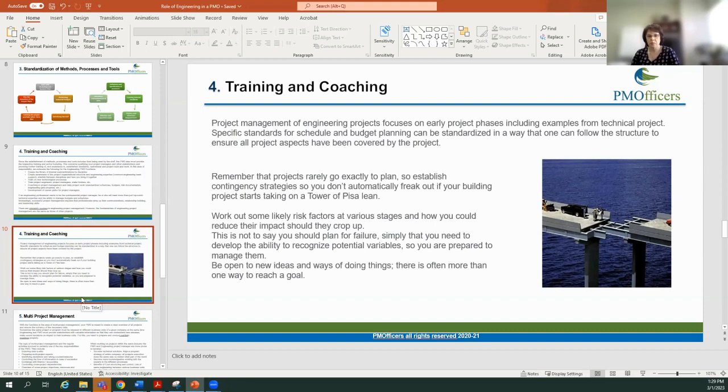So as an example, you can create templates for how you break down your scope. The same can follow through your budget and your schedule template, so that you're making sure that every document aligns well with good consistency.